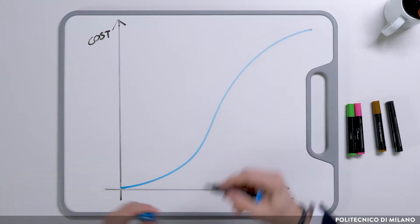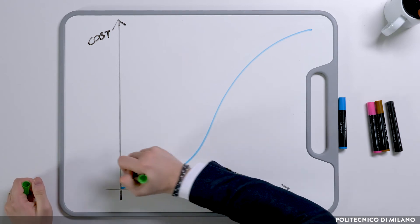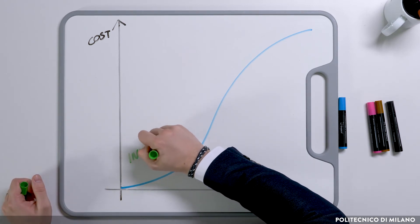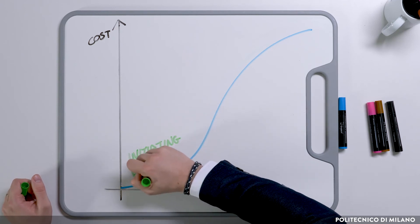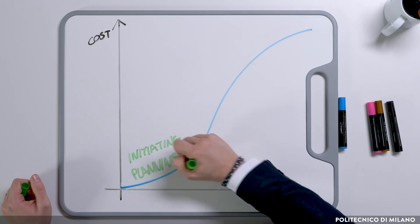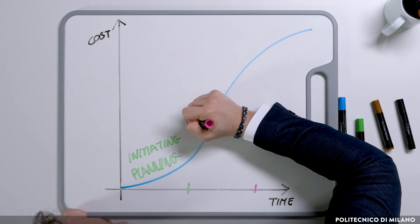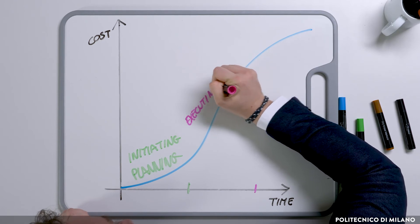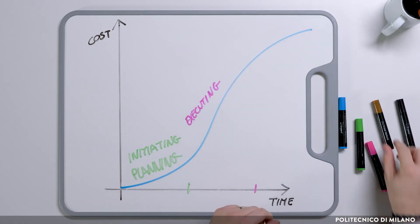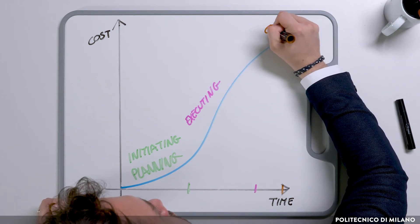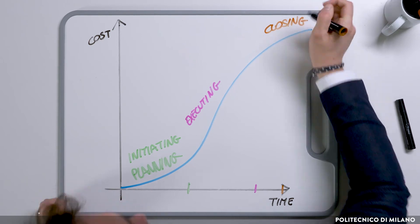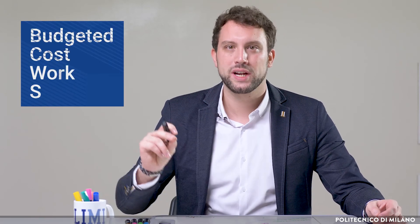The project baseline is usually an S-shaped curve, consistent with the expected resource usage across the phases of the project: a low consumption in initiating and planning, a strong resource usage in the execution phase when material is being used and work is actively happening, and then again a less expensive phase in closing. The time-phase budget also goes by different names — it is known as the baseline or BCWS, Budgeted Cost of Work Scheduled, which we'll see is the starting point of the controlling activities.